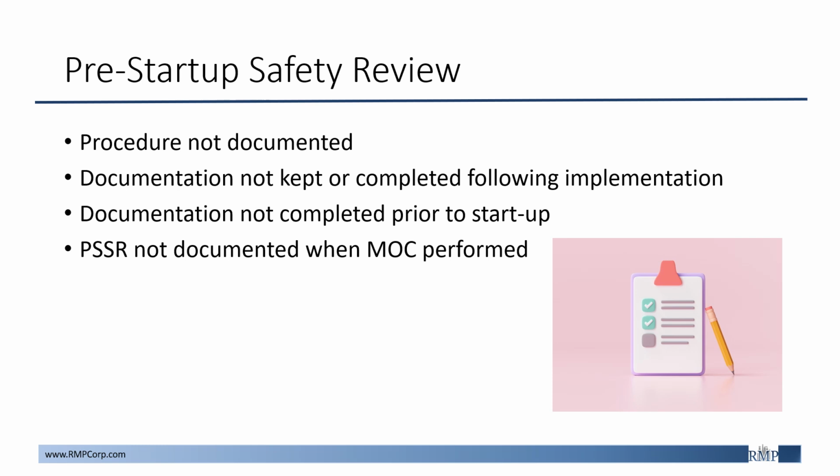So some tips to ensure that your PSSR procedures are meeting regulatory requirements would be to ensure that your construction or all equipment is in accordance with your design specs, all procedures are in place, your PHA is completed if that is required, and that the recommendations associated with this are closed, and finally that any type of training that may be required is completed, there's documentation, and that is reviewed to ensure that your personnel are adequately trained on any changes.